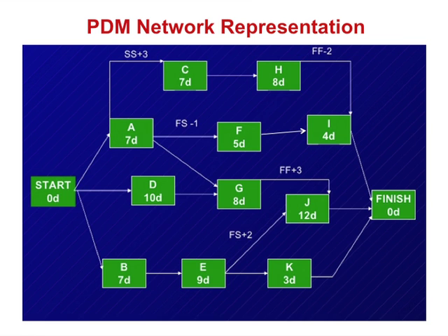Now plus represents lag. Plus represents lag, there is a delay. So A will start, and after 3 days of delay, 3 days later, C can start. C cannot start 3 days before that.